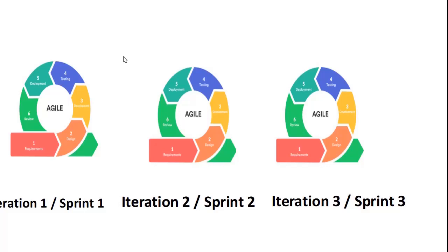In every release, for example, one release has 3 months, and in those 3 months, every 2 weeks or so they treat it as a sprint. Usually in the agile process, each and every sprint should be a cycle of 2 weeks or 3 weeks. So every 2 or 3 weeks they will release new features or new enhancements of that project.